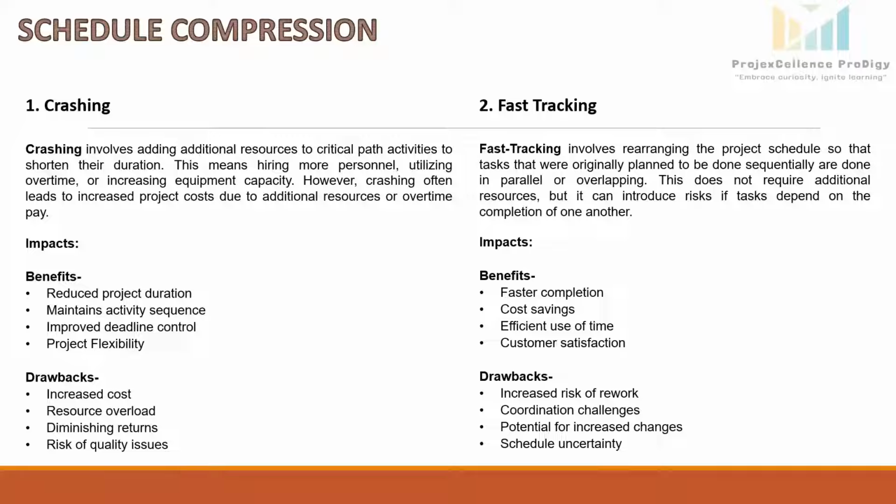What will be the impact of fast tracking on the project? If we talk about benefits, first, faster completion. Fast tracking allows overlapping tasks, which can significantly speed up the project timeline and lead to earlier completion of the project. Cost savings. Unlike crashing, fast tracking does not always require additional resources, which makes it a cost-effective way to shorten the schedule.